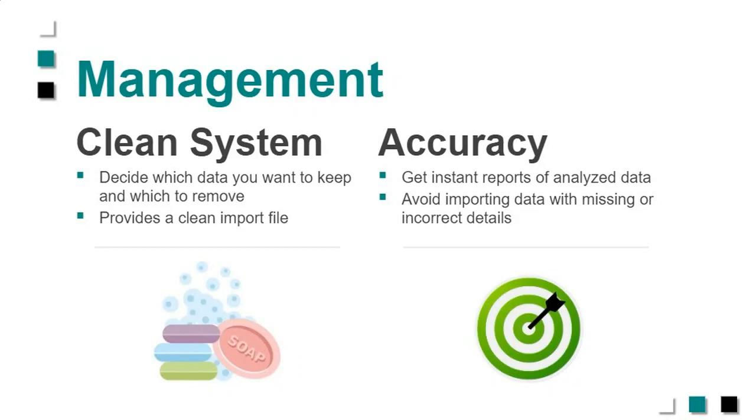And the key thing is you don't want to lose any data, as some of the questions were related. You know, when you're in claims, you need to be able to show that nothing was changed, the schedule was as provided, and if there were changes, as you saw, we can give some feedback as to what those were. And it might be a good idea to send that and get agreement that this is the schedule changes that were made, so that you've got that documented as you go.